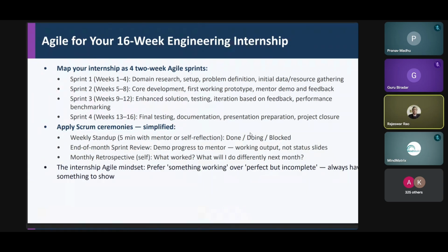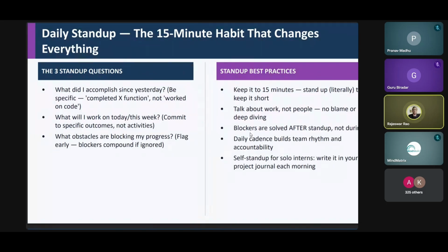Yeah, next slide, please. So one important thing which I would suggest and recommend to all of you is, I've spoken a lot about daily stand-ups. I think one set of questions, which are 3 mandated questions, which I found were very important, is every day you need to start your work, say around 8 o'clock. By 7:30, you should ask these questions. What did I achieve yesterday? Plan versus actual achievement.